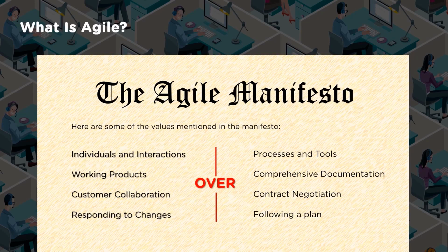Now, if I have a working product, if I have a bigger product, I keep creating every small module of it and start integrating it to the base model. Now, I will only focus on the documentation for that particular working piece, which I am going to create in the next iteration. Then my documentation changes are less. And also, initially I would have a full skeleton of the entire product which I'm going to create, the roadmap. And upon that, I'm going to make the detailed documentation only for that working piece rather than the full product itself.